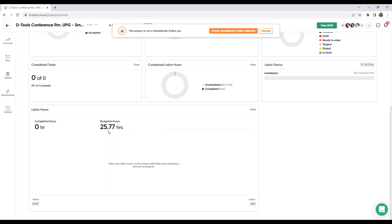Because we're focusing on scheduling, I do want to point out that we sold this job at about 24 hours. And as your technicians or field users are going to clock in and out at the job site, we're going to deduct that time from the amount of time sold. Making sure that you're tracking your labor hours and selling it at the right amount is crucial. It's important when creating your opportunities and sharing those proposals.